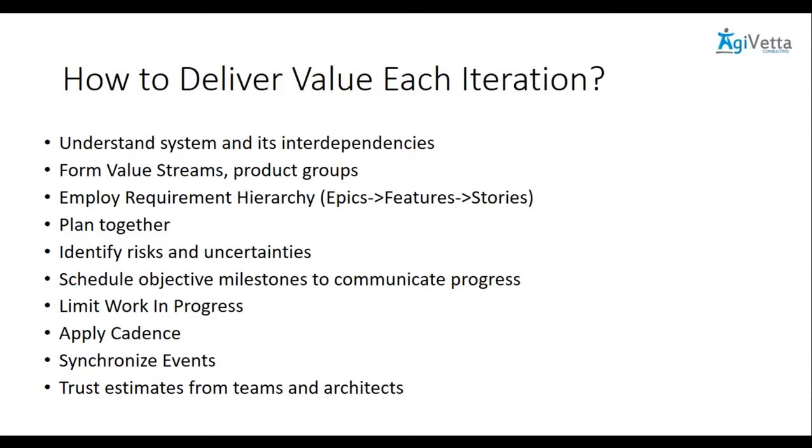Progress will be communicated, and then we'll get some feedback, employ that feedback, work another. But because all teams are coming together, they plan together, identify risks. Doing that for every iteration is a very expensive exercise. And then the customer might not be looking every iteration. It is rather beneficial to plan for multiple iterations.